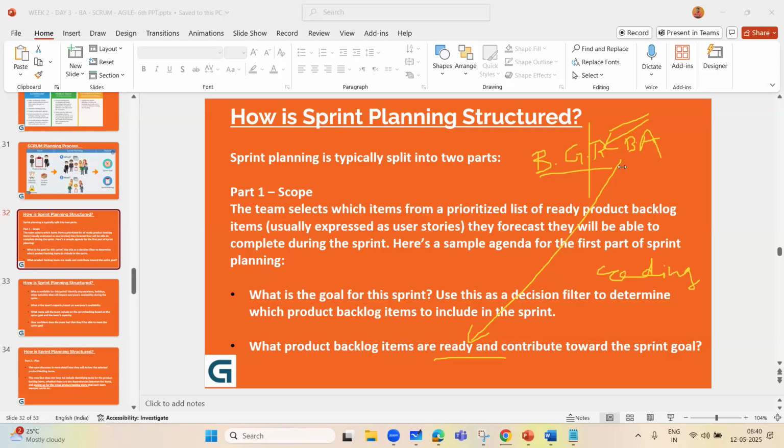And that's the reason it is always important to run the backlog grooming call before even the sprint planning meeting starts. How it is going to benefit you is that when it is ready, any questions, if they occur, are already well answered before the sprint planning meeting. With me so far? Yes, no? Yes. So always, as a future Scrum Master or business analyst, keep these things in your mind.